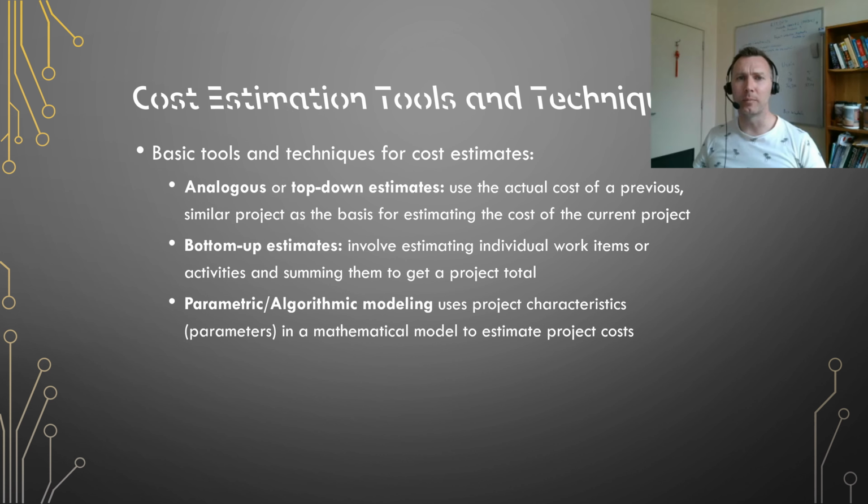But there are some problems that are common to estimating costs. Estimates are done too quickly, people lack estimating experience, human beings are biased towards underestimation, and management desires accuracy. And we can't keep everyone happy with all of these problems.